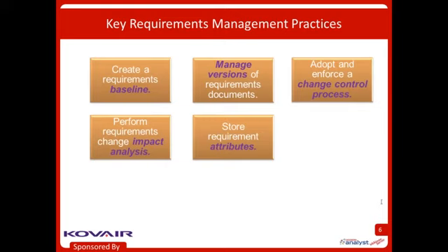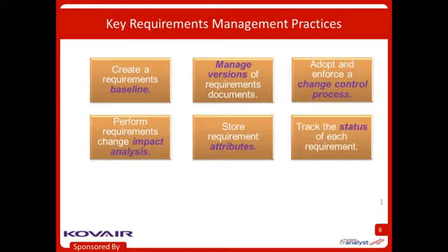You might want to store not just the statement of some intended functionality, but also requirement attributes, some richer set of knowledge about each requirement. One of those might be status, so that throughout the course of the project we can monitor the progress of each requirement as it goes from concept somebody had one day to finally implemented and verified in the product.